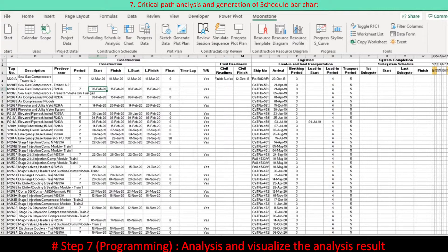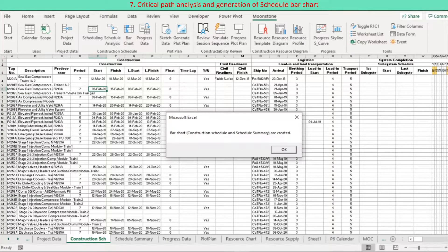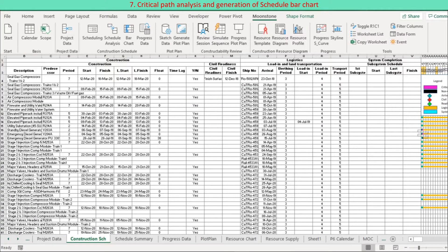The schedule becomes logical through critical path analysis. Early schedule is based on the forward pass algorithm and late schedule is based on the backward pass algorithm. The early schedule is compared with the late schedule to identify critical activities featuring zero float. Schedule restraints such as civil readiness are considered — for example, installation should be on hold until civil is ready. A bar chart is created to reflect the resulting logical schedule.